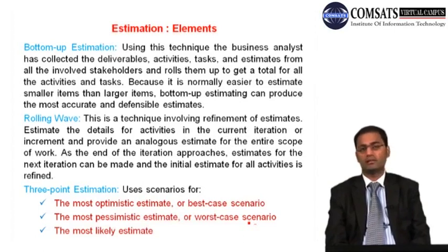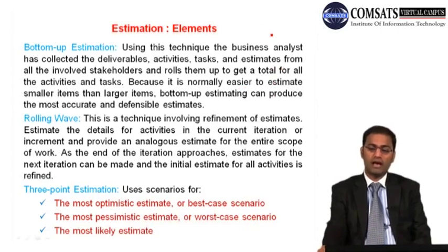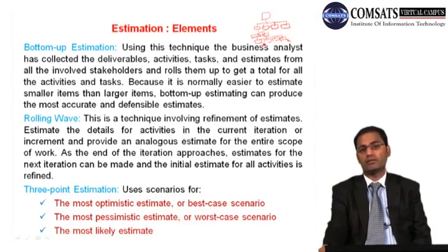So accuracy is plus minus 5%, and over there we have a project, and this project is divided into work packages. These work packages are further divided into smaller work elements, and these work elements are further divided into activities. We can estimate the cost of these activities, because those are quite manageable